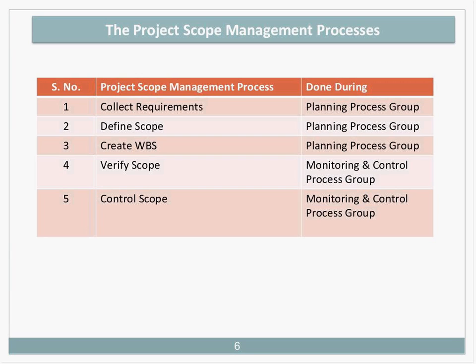Project scope management ensures that we define an agreement on what is included and what is excluded from the project. This is done by executing the processes of collecting requirements, defining scope, creating the WBS, verifying scope, and controlling the scope.